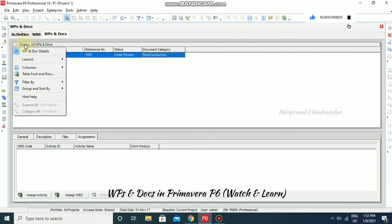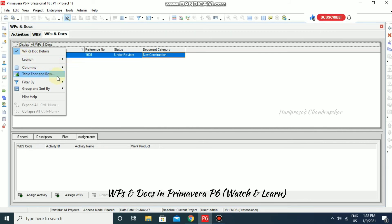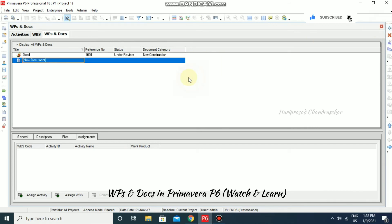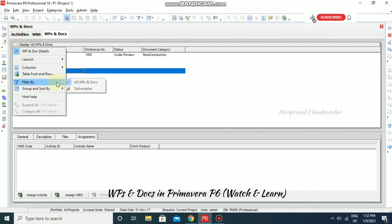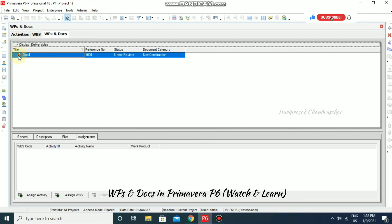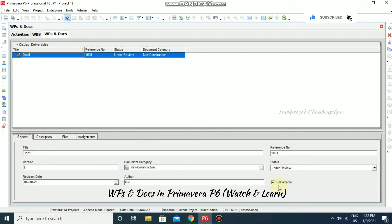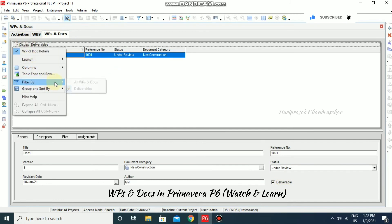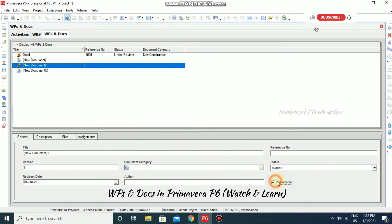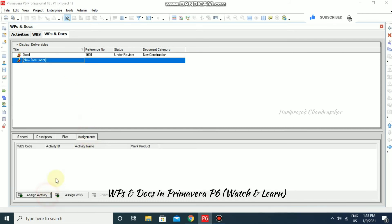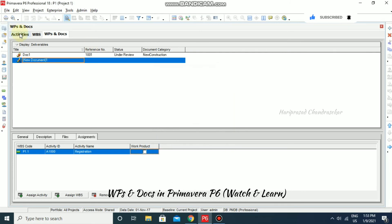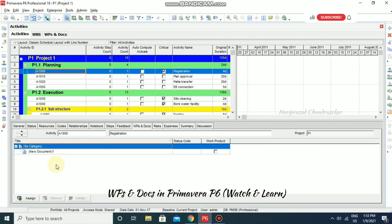In WBS and Docs you can manage private documents, set columns, default version, customize table font and row. You can filter by all WBS documents or only deliverables. I am adding another document so now we have two. You can filter by deliverables to make it easier — that is the purpose of the deliverable icon, which you can tick here. You can also go to Assignments and assign a document to an Activity.